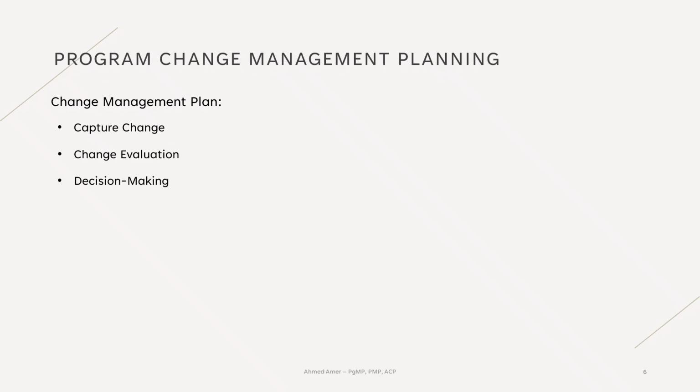How decisions are made? Who is the right cohort to address the change? Should we have a quorum to make a decision whether a change is approved, deferred, or rejected? How those decisions are communicated to all impacted stakeholders? How the change is documented, including supporting details and rationale? And finally, how the change funding and work are authorized once the change is approved.